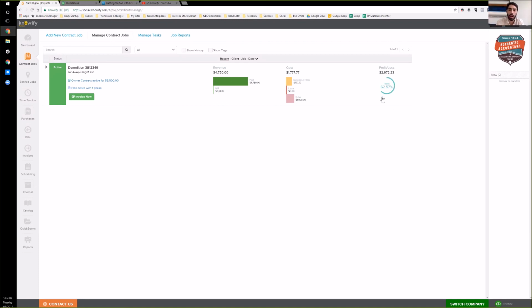So I know that this profit statement is a little bit skewed, but I get it. This is basically looking at the way in accounting we look at contracts and we say the cost incurred to date divided by the expected total cost is the percent complete, and then times that by the contract value. That's how much we should have billed. This is saying that number is coming out $1,800 higher than it should be because we haven't incurred enough costs to justify this billing. Exactly. So that's just how we get material, labor, subcontractor cost in. This is how we're calculating revenue.